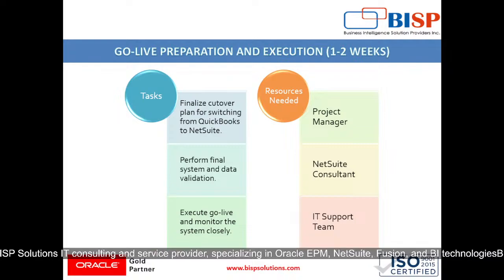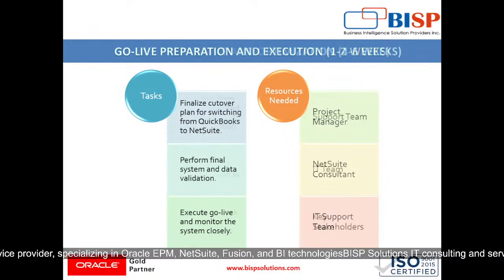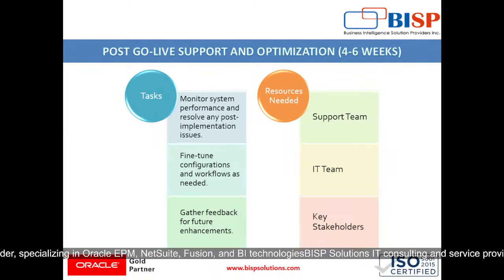Then the resources needed will be project manager, NetSuite consultant, and IT support team, which will help in go live preparation and execution. Then after we go live, we will be providing support post go live, and optimization will be done. It will be a time period of about 4 to 6 weeks.